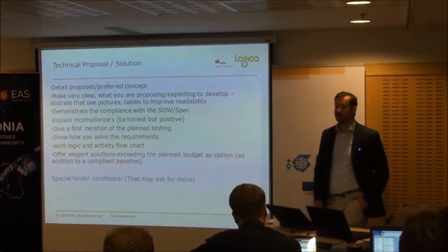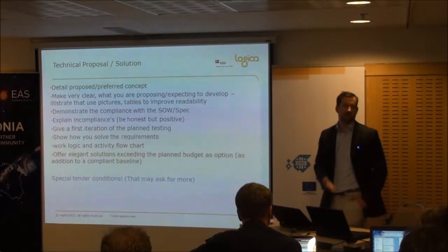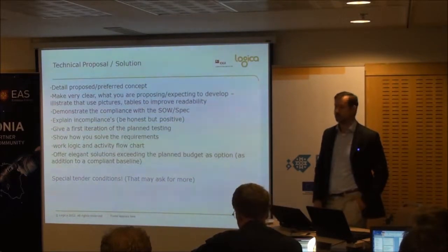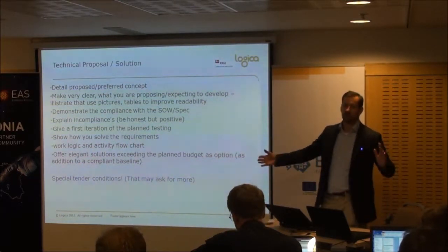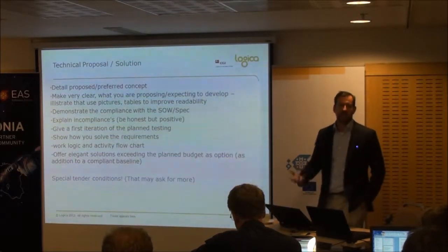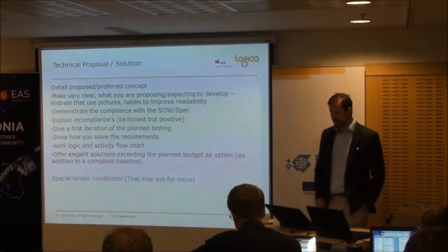You'll need to explain the work logic. What's the process you're going to involve? If it's software development, you'll probably need to talk about the methodology. Usually they have a very precise methodology, and you'll have to talk about that. If you're going to use some kind of agile technique or something like that, then you'll need to fit it within their overall process, because they won't break their process for you. You can group within it, and there are ways of doing that, but they won't break it.